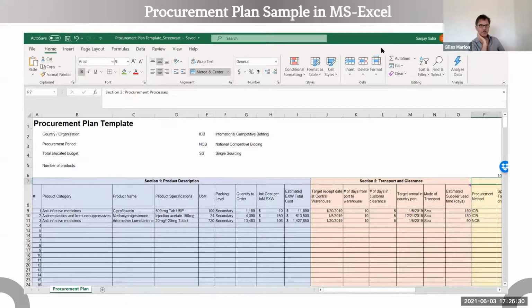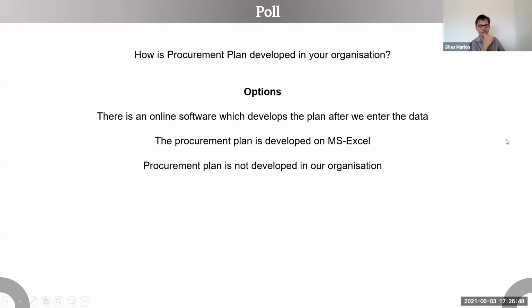the risks linked to the procurement, and yes, you are very right, Kenfrey. There are a lot of risks when you're doing such a complete plan. Just a few things to mention on that. One of the key risks that we experience is having the right information at the right moment. So it's mostly the internal risk. How you're going to be able to have the right quantities, the right specification from your own internal partner at the right time to be able to start the procurement plan.